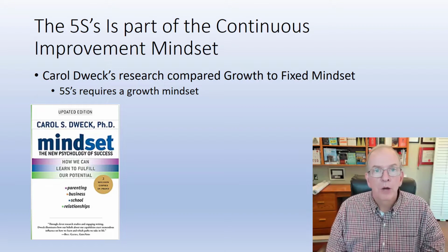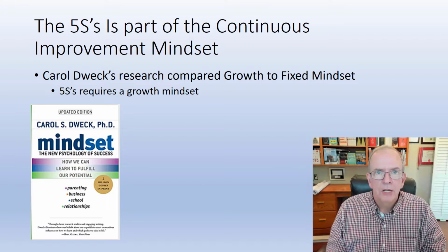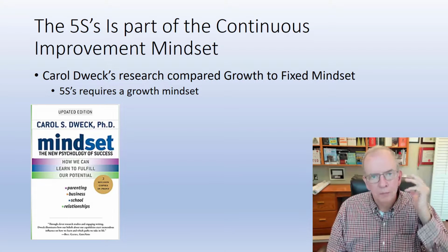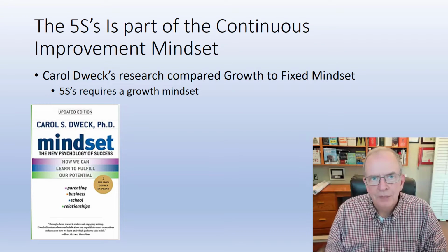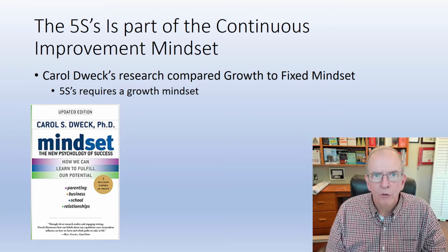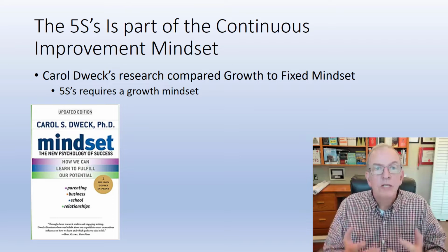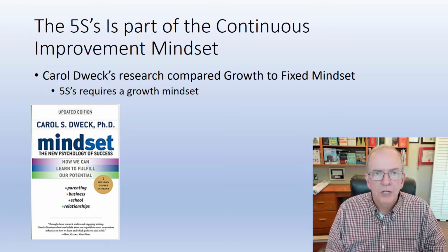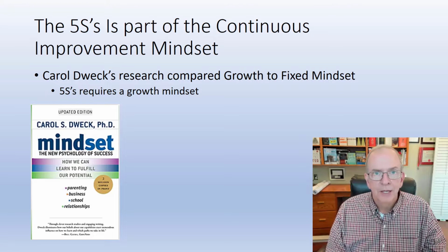DOWNTIME. And if you subscribe to my channel and check the playlist, you'll see some of my previous videos where I've gone through the 8 areas of waste and explained what they are. But just quickly, downtime: D is for defects, O is for overproduction, W is for wait time, workers waiting for work, work waiting for workers. N is for non-utilized talent, not using and collaborating with the experienced people on your projects. T is for transportation, I is for inventory, M is for motion.